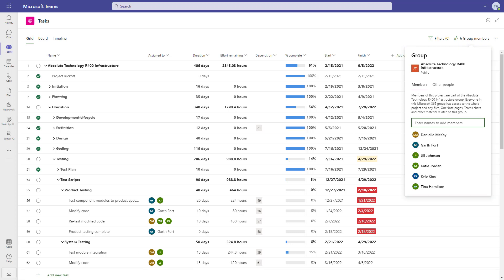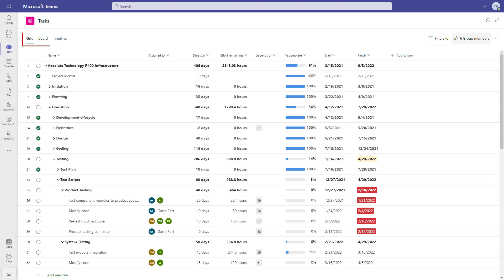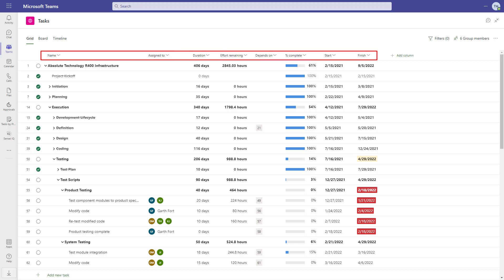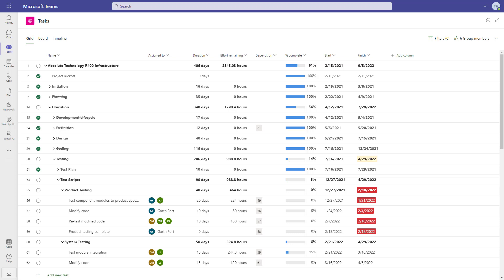There are three different ways to interact with the tasks on your project: the grid view, board view, and timeline. Here we have all the tasks laid out in a grid view. There's the task name, who it's assigned to, duration, effort remaining, dependencies, percent complete, start and finish. Those are just the ones we're currently showing and there are more available.